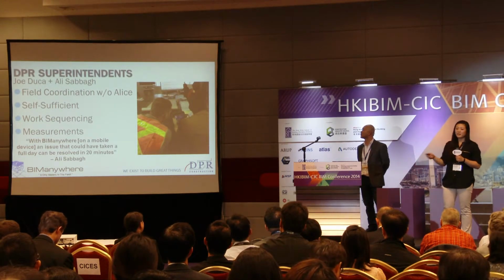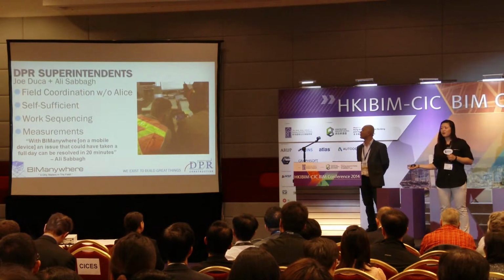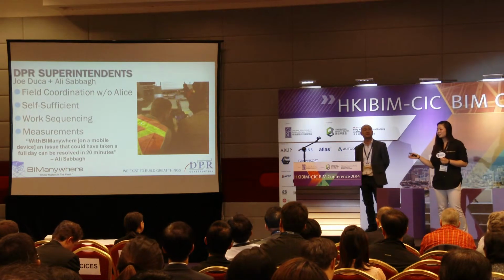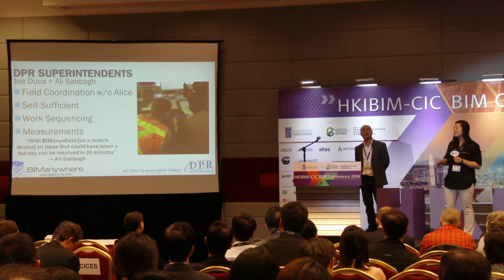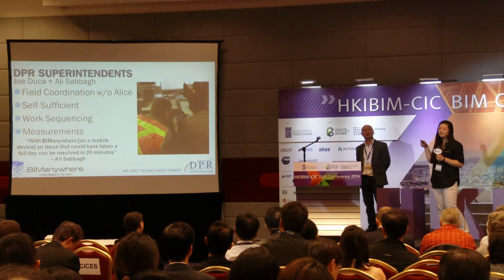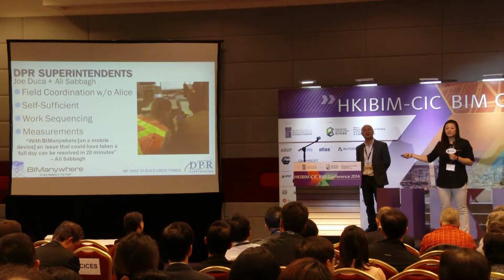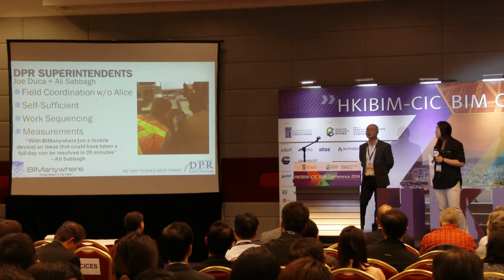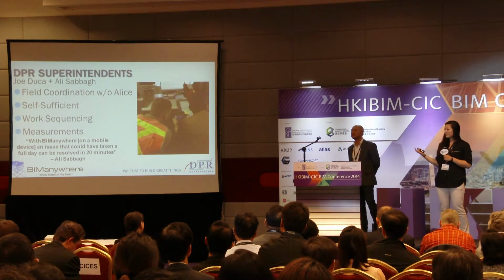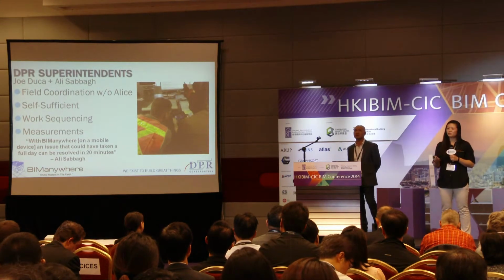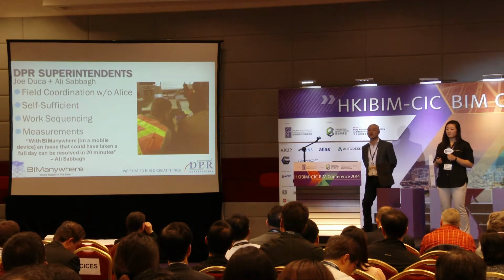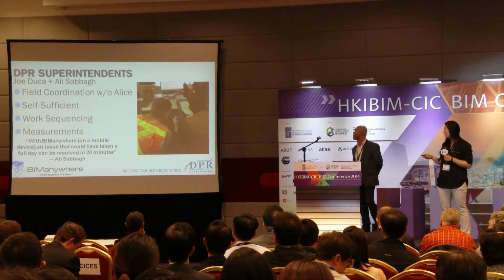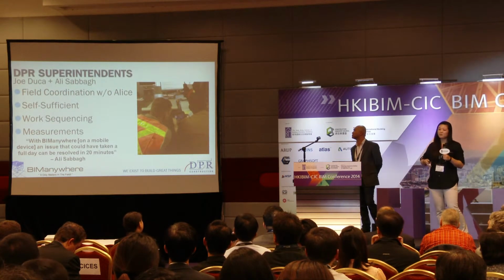Traditionally, they would be out in the field, an issue would come up, and they would run back to the office and grab me. I'd have to stop what I'm doing, go to that location in the model, take some measurements or show them what's wrong, and then they'd have to take that information back out into the field and find the foreman or general foreman who brought up the issue, who might be elsewhere doing something else by now. Having the model at their fingertips and being able to solve those issues right then and there saves so much time on multiple people's parts. They now use the model for work sequencing, they are highly self-sufficient, and they can make measurements and everything like that.